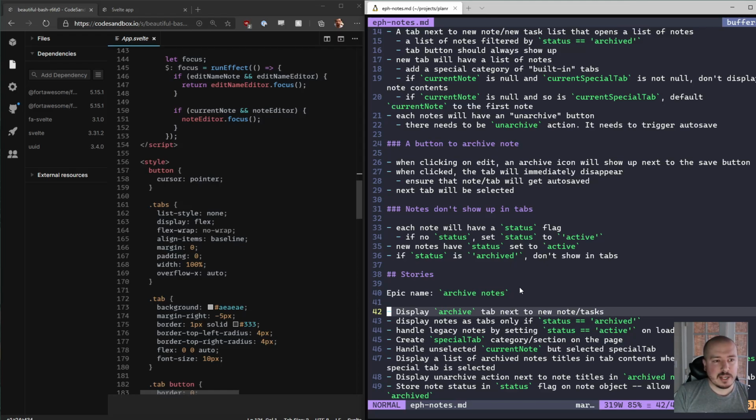When I say that, you might be thinking, wait a second, adding a button in the tabs, how does that take one day? Okay, well, you can add it, that's fine. You're probably gonna have to add tests, right? So we gotta do that. It probably needs an active state, that's fine. You have to find an icon, maybe talk to a designer, maybe talk to the product manager about it. Then one point goes from start to finish.